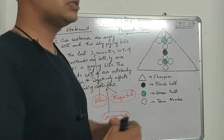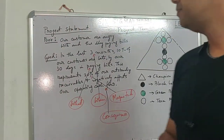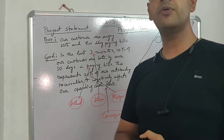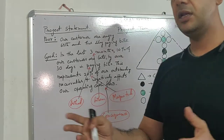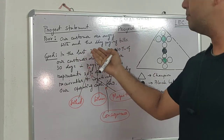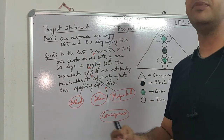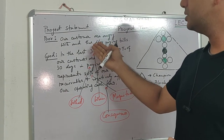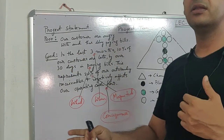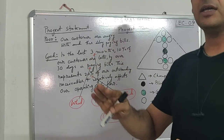After all these activities we need to formulate our project statement. There are different approaches, but not all statements are ideal project statements. For example, a poor statement would be: 'Our customers are angry and thus delaying paying bills.' In that statement there is no data — no dissatisfaction level, no timeline for how many days they are delaying bills, and no impact to the business mentioned.